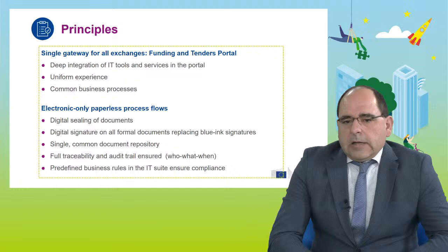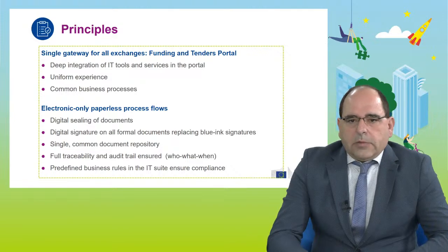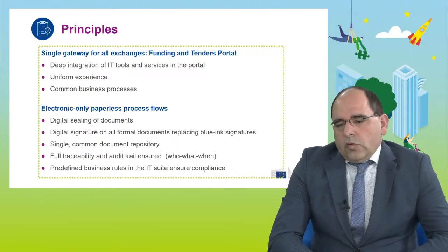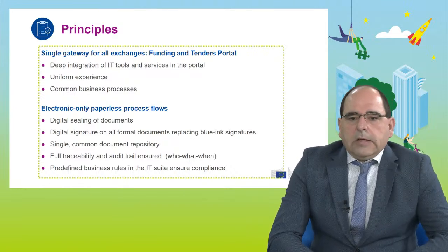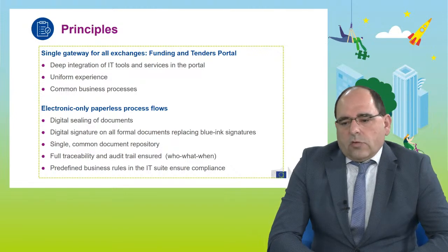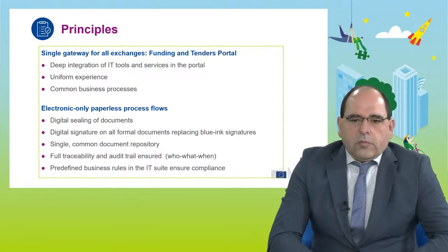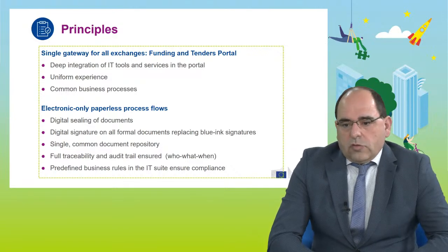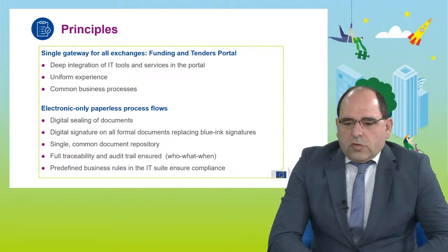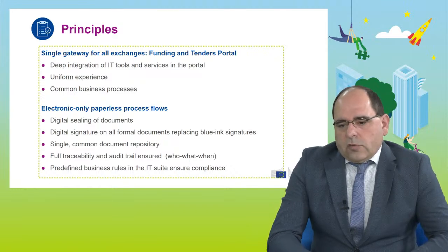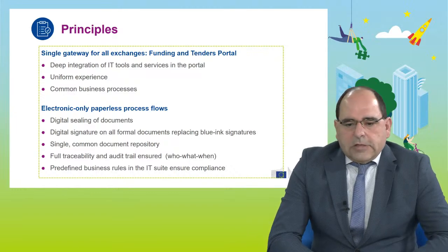So please try to create different accounts, different roles, and assign them the same task, because it is important for you to know if somebody signed a document, to see who did it. So you can do this by not reusing accounts, but creating multiple accounts and assigning this role to different persons, so that you always know who signed, for example, a specific document for a project. Otherwise, you still know the role, but you don't know which person was using it. So a reminder: please try not to reuse accounts, but create separate accounts for different persons using this role, and then you can assign them the same privileges if they need to perform similar tasks.